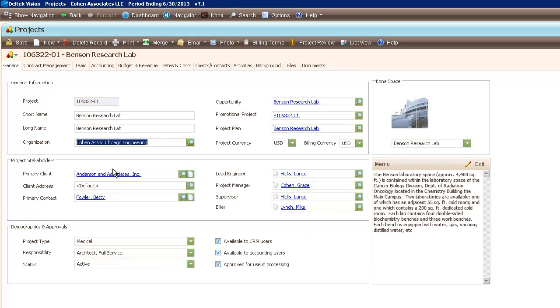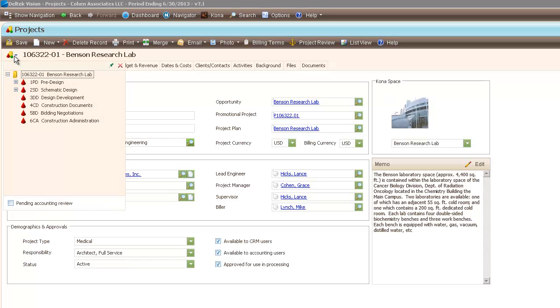The other idea is when we look at our projects, some might be complex, some might be quick hits, some might be very easy. On a project-by-project basis, you determine how you want to break those projects down from a work breakdown structure perspective. We'll support 3 levels of work breakdown structure. Each component of that work breakdown structure has its own unique characteristics and can drive its own unique behavior.